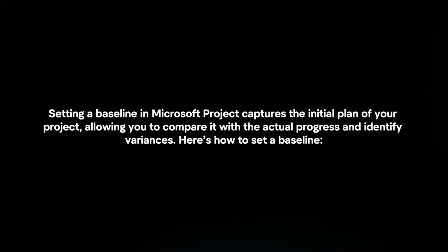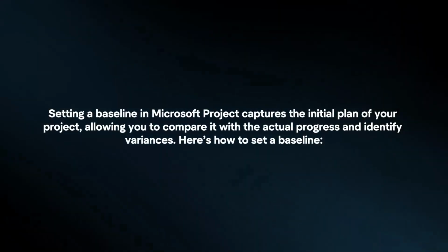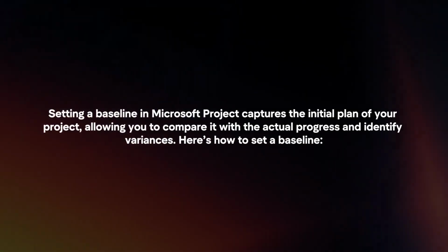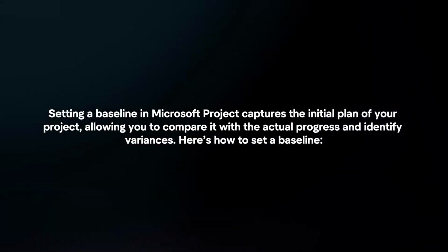Setting a baseline in Microsoft Project captures the initial plan of your project, allowing you to compare it with the actual progress and identify variances. Here's how to set a baseline.